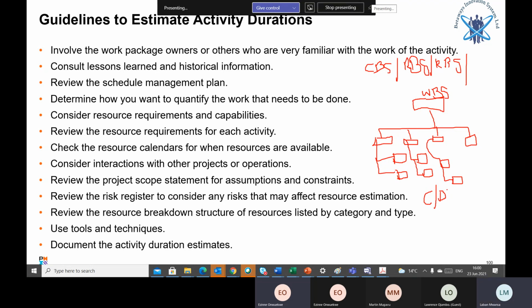Okay, and it's pretty easy to follow because what was originally WBS becomes a CBS, cost breakdown structure, which means that the aggregated costs will form the project cost, the project budget will be here, because you need to do estimates for this, then you put the estimates together in order to arrive at what you would call a project budget. The only disadvantage with WBS is it doesn't show you the flow diagram, the precedence, what must be done first and next.